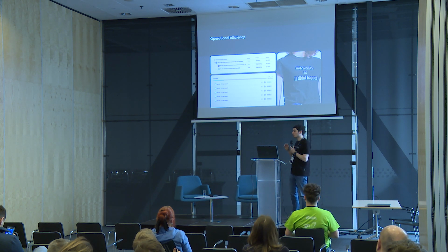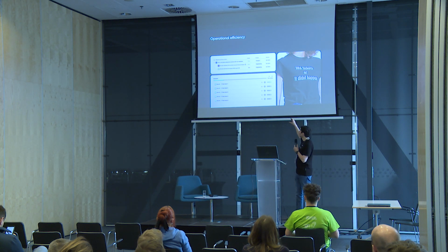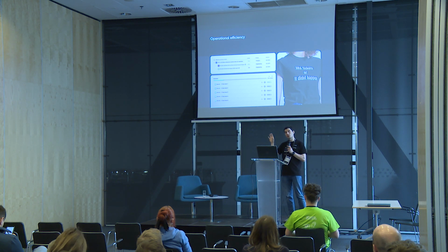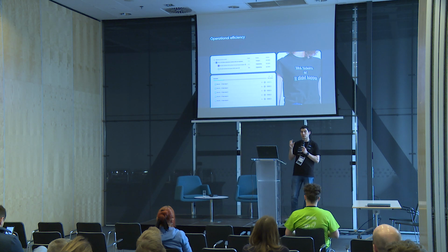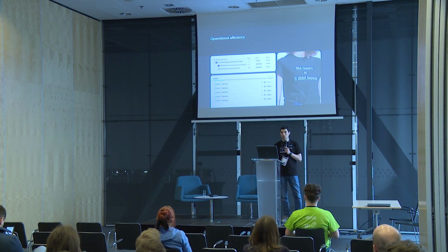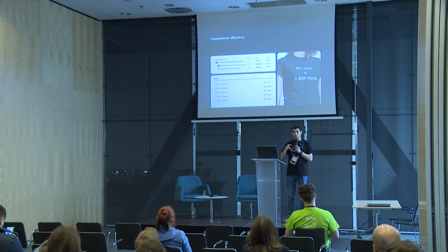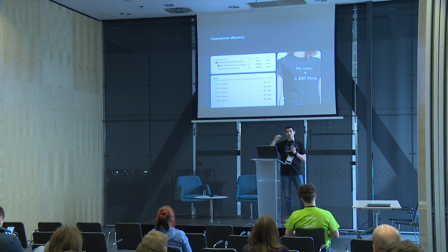And to make your life a little bit easier in tracking the progress towards these goals, we're helping you to track progress for Epic initiatives and other Jira issues automatically, based on their own resolution status or the resolution status of their child nested elements. So, for example, your dev team can be responsible for the epic, and this epic will be graded automatically based on the Jira resolution status of its child issues.